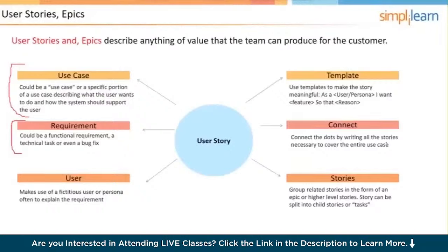And so the priority of the user stories in the product backlog, while it might start with just simple functional user stories coming from the product owner, will evolve until it includes some other things that are also considerations when it comes to priorities, because successor, predecessor relationships, dependencies, and things like that are considerations.